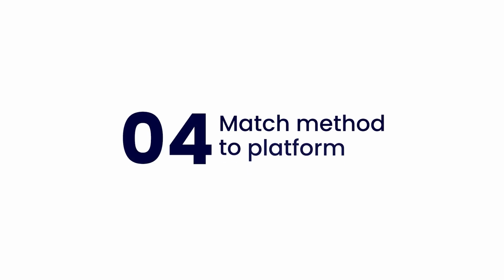Fourth, establish different migration methodologies for each platform category. Microsoft Forms migrations can often be completed in bulk with standardized templates. Power Apps migrations require individual assessment and custom development. Power Automate implementations need workflow mapping and approval chain validation. Using the same migration approach for all 3 categories creates bottlenecks and quality issues.